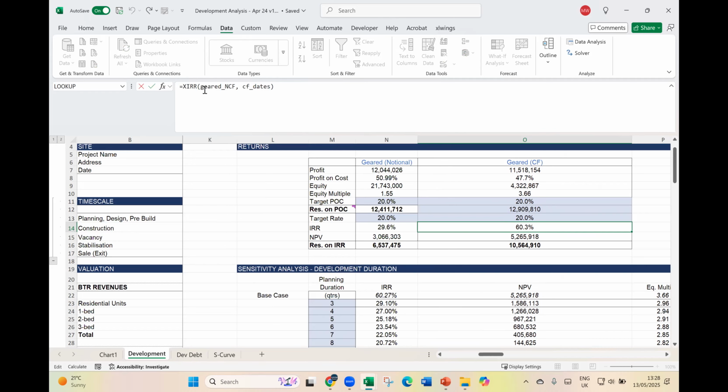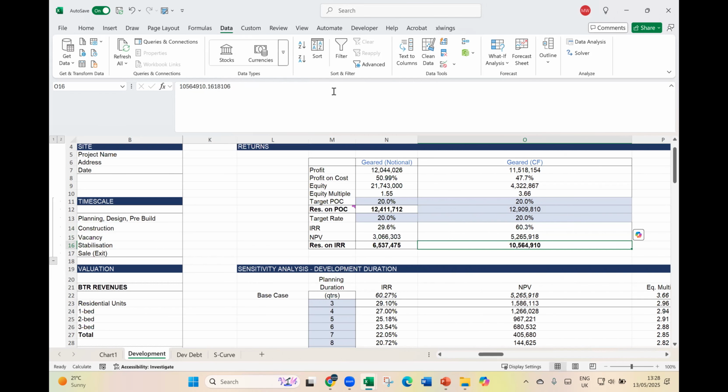So when we use the XIRR, XNPV, remember that you need to use the dates of your cash flow. So you need cash flows with the dates as well. And then we can calculate here the net present value. Okay, so the net present value is the discounted cash flows for each of those periods. So then it's going to be discounting the 15 million.